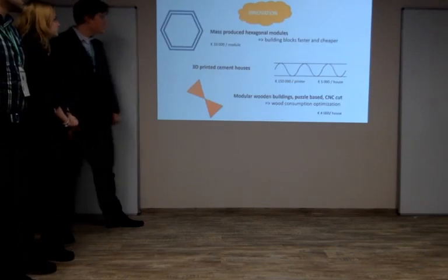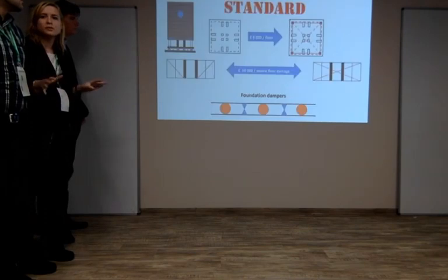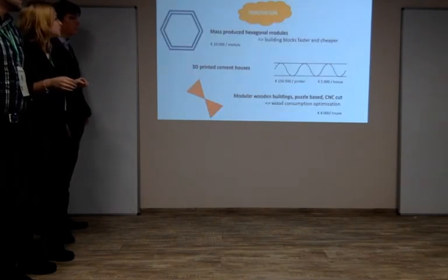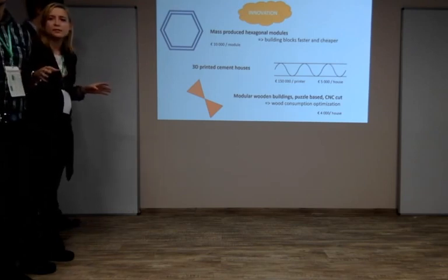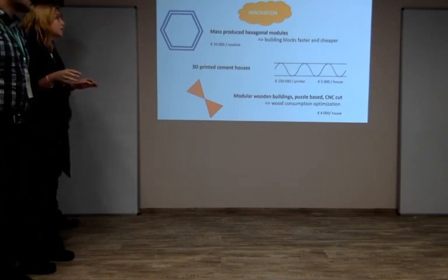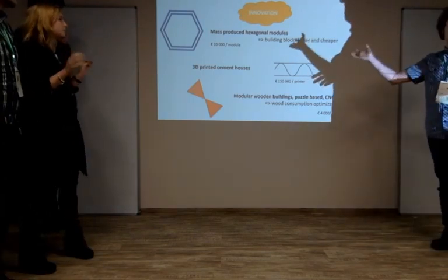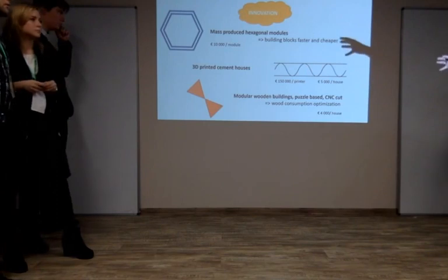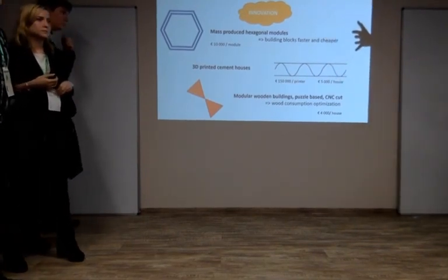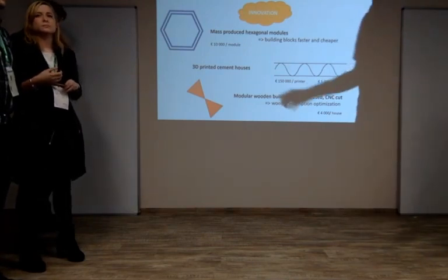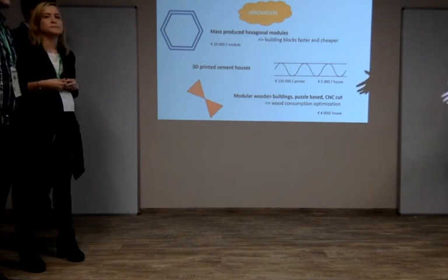The costs are spread out, so they are also on the innovation part. Some general costs, for the modules, or for the ranking system. For one building, let's say. Let's say we have 10,000 euros per module. We will need two modules per apartment, at least, because one module is around 30 square meters or something like that. So in order to build four apartments per floor, that means 80,000 euros per floor.